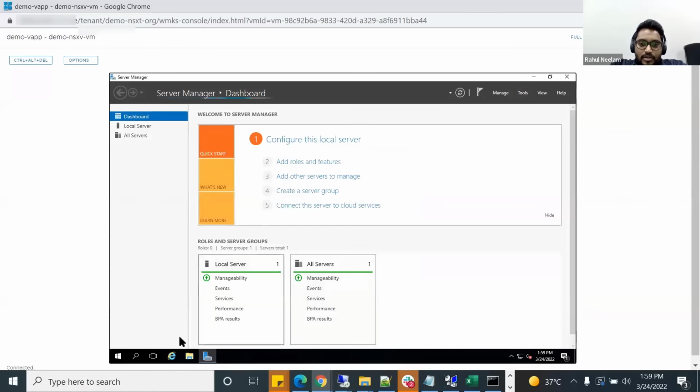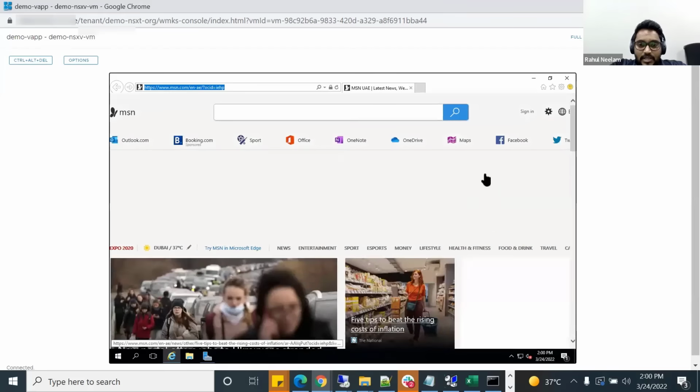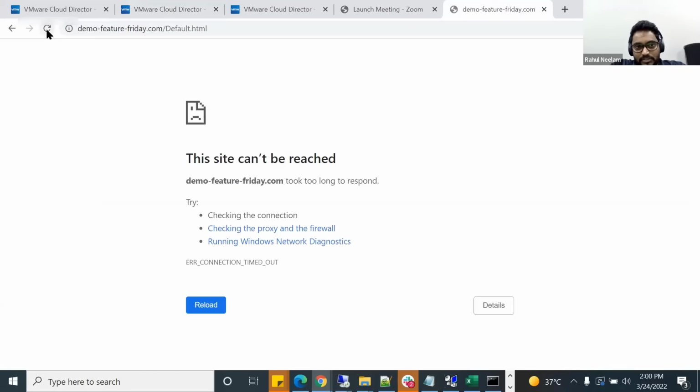As Shashank mentioned, if the application is being managed by customers. See, in the cloud, we offer all the models, like IaaS, PaaS, SaaS, right? Majority here, we provide IaaS and PaaS as a service. So most of the applications are managed by customers. So we'll call their vendors. The vendors join the call and understand how it works. We'll get the availability of the customer and the vendor, go on a call, and do the migration in that call itself. The steps of this migration have also been defined at a very high level and will be discussed with the customer before the scheduled date and time.